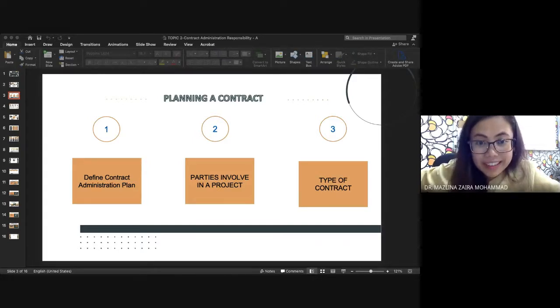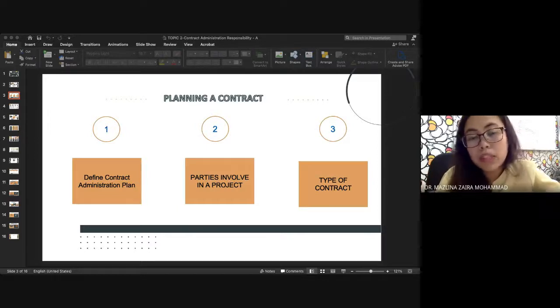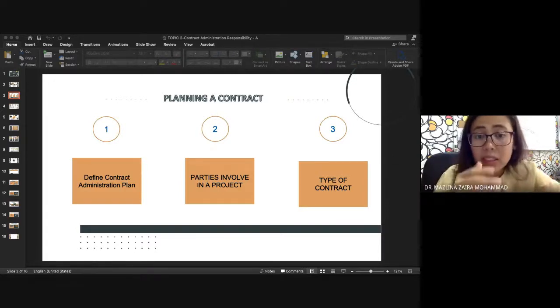So they have to prepare the safety management documentation. They have to identify DOSH, and TNB for the utilities. What else? Related to water, if they want to install plumbing piping, Syabas in Selangor; in Johor, they must deal with Ranhill or SAJ. You got the idea? These are the parties they have to identify.